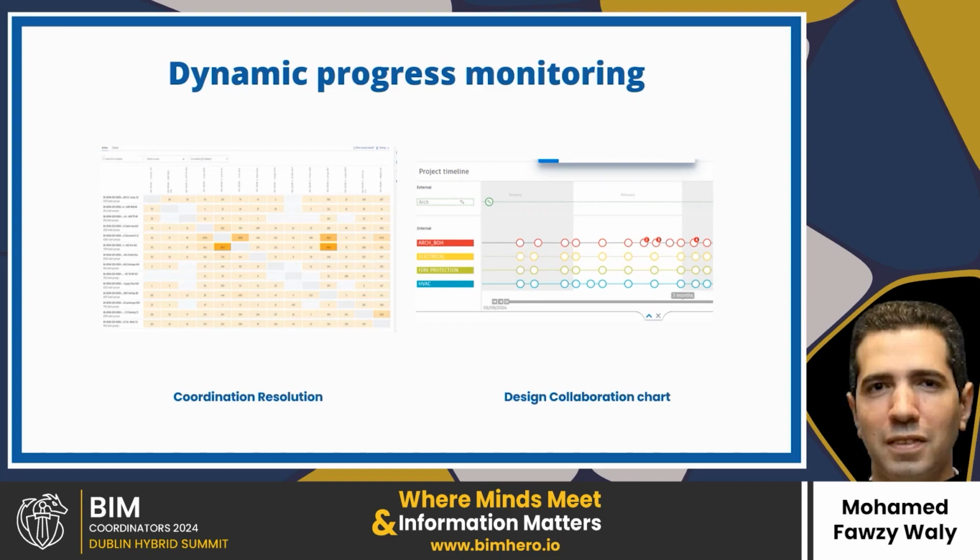While in the model coordination module, the clash detection process is enhanced by presenting clash results in a clash matrix. This matrix visually organizes clashes, helping users quickly identify problem areas across different model elements. The clash results are automatically updated as new models or packages are added, enabling teams to stay updated on coordination issues without having to manually refresh the data. This process significantly reduces rework and fosters a proactive approach to resolving clashes in real time, which leads to smoother project delivery.